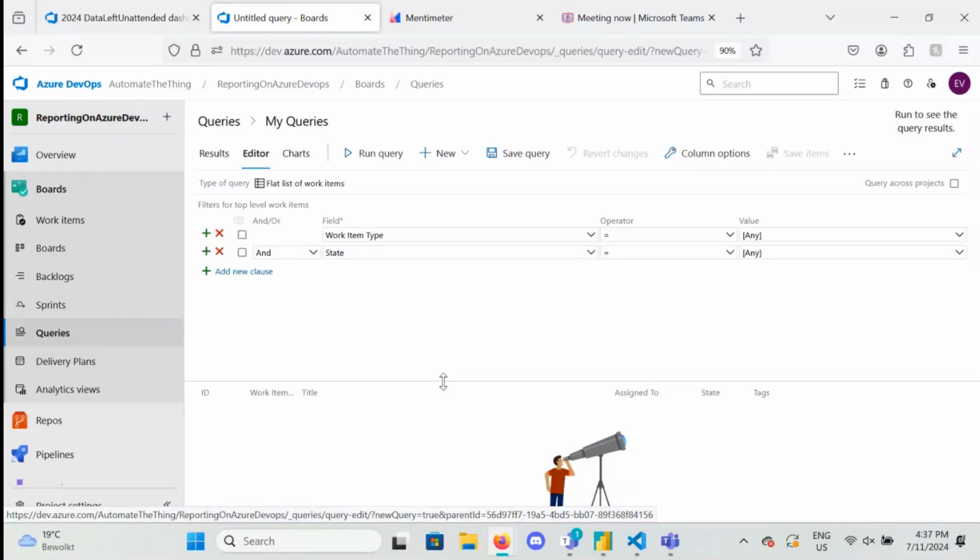So for example, at my job, I've created a query to check which work items don't have a parent. And that's not because it's very sad if they're orphaned, but mostly because I want every work item to be connected to either a feature or an epic. And I don't want any leftover items, like the issue we have or the bug we have to fix. So I regularly check, every week, every sprint, are there any orphaned work items? That's something you can very easily do.